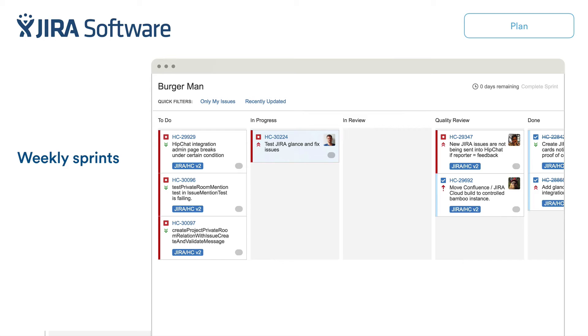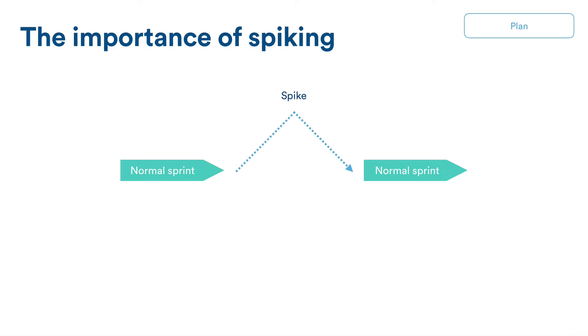And three is we can very quickly realize when an initiative is going off-track and what we need to do. For example, canceling an initiative if it's basically taking much more time than what we thought originally and is not that important in terms of reaching some key results. But planning and building are not separate activities. They really go hand in hand.